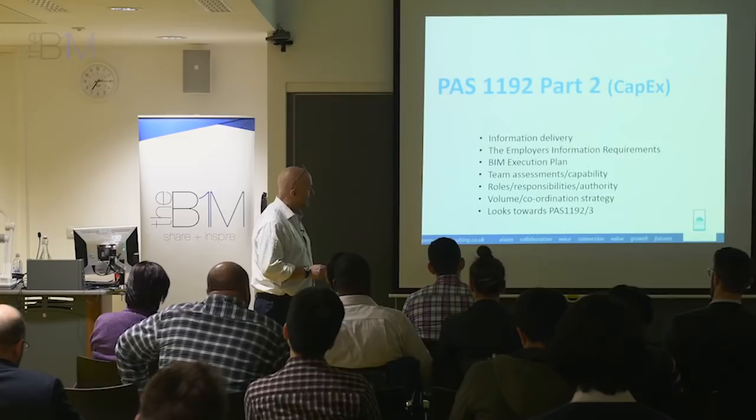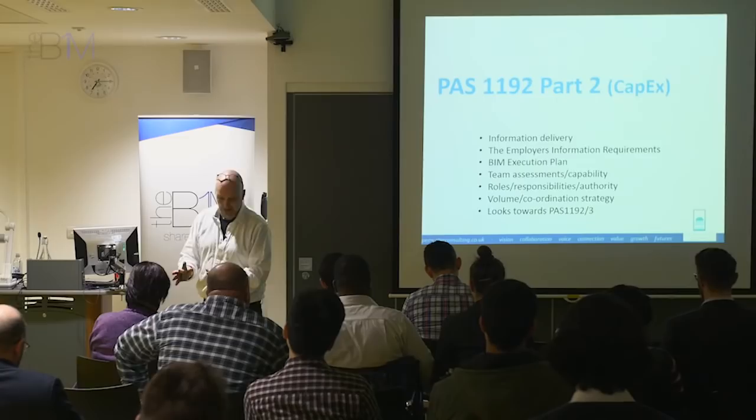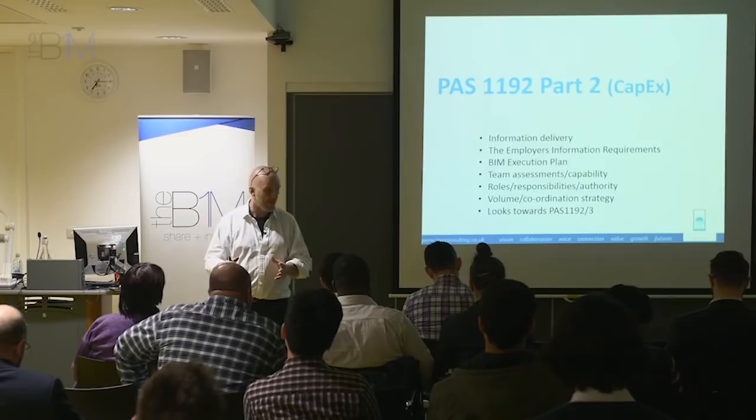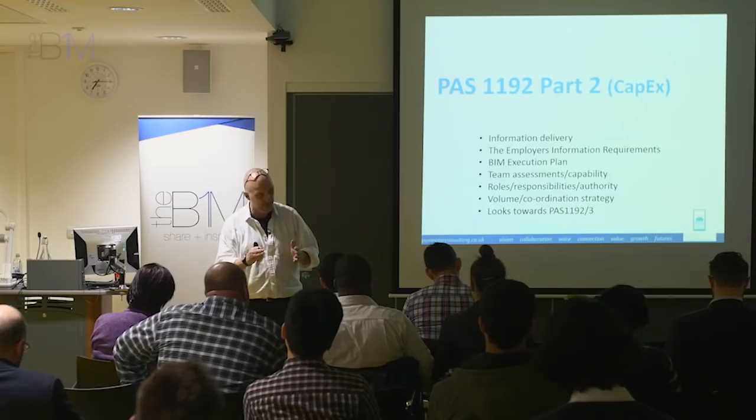Because it's the employer saying, I want to use BIM on this project. This is what I'm trying to achieve. This is how you will use BIM. This is the information I want out of BIM. And this is how I will use BIM once you've finished your part of the project. And it's based upon things called the plain language questions, which you will find on the BIM task group website, which is a way of feeding people in to ask the right questions to produce the EIR.